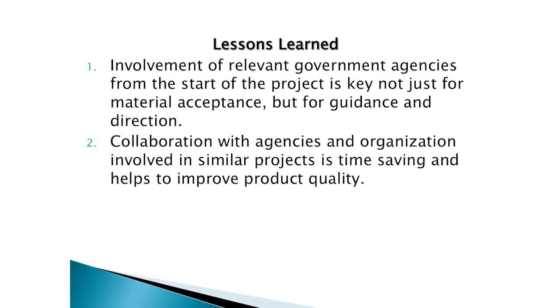So the lessons learned from the project is the fact that we started off by getting in touch with the primary agency in charge of curriculum development and book development. And I think that kind of got us involved with the government agencies right from the start of the project. And that has helped, because we started with them, we've maintained that relationship up to the end of the project.